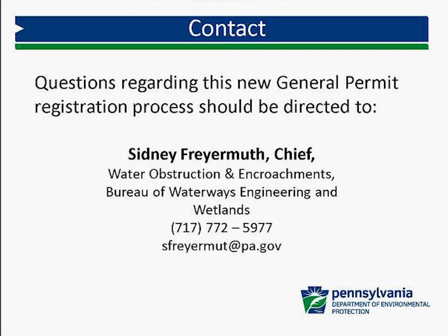What is considered an oil and gas project? Are smaller gas utility lines considered oil and gas projects? It all depends on how they're classifying their oil and gas project. If it's an oil and gas gathering line, by definition, it's processed by DEP Oil and Gas. If it's a utility line, a transmission line that's sending gas, it may or may not be reviewed by a county conservation district who has delegation. So it all depends on how the project is characterized and who will do the review.